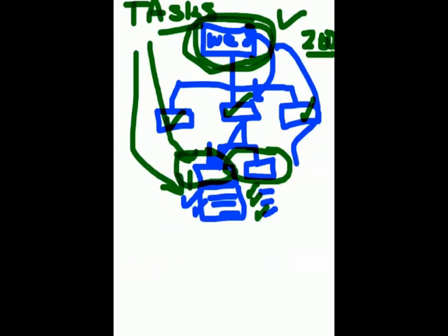We broke it down. This is called decomposition. We're decomposing the project to the work package level. So down here is the work package. A work package is usually work that falls between 8 to 80 hours of work. The reason that's important is because now we can assign that work to somebody to work on.